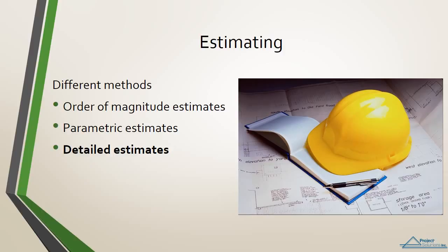Detailed estimates. Detailed estimates, also known as definitive estimates, form the backbone for the bid, the contract negotiations, and the project cost control. Detailed estimates involve quantifying all the elements involved with the scope of work and pricing out each of those elements. Depending upon the size of the project, detailed estimates are highly specialized and take a great deal of time to complete compared to other types of estimates. This estimating module discusses instructions for detailed estimates.